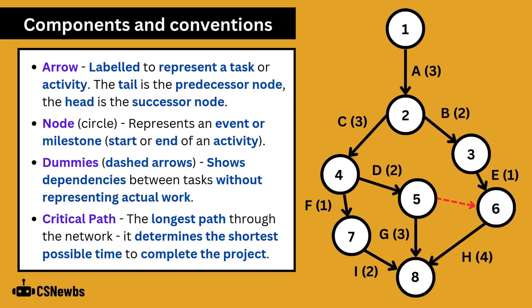Dummy activities or dummies are another component in arrow diagrams and these are represented by dashed arrows. They show dependencies between tasks without representing actual work. They have a completion time of zero and we'll look at those shortly.